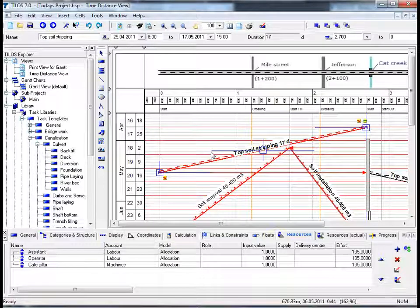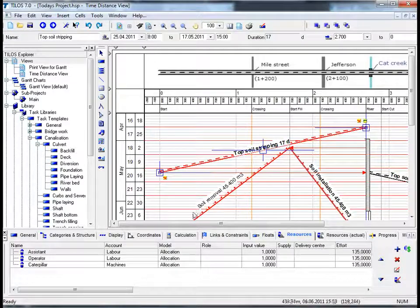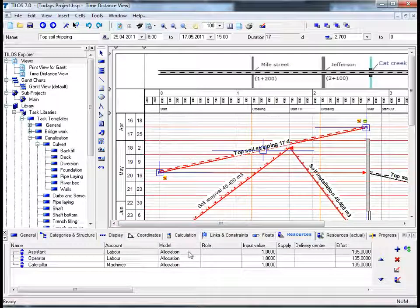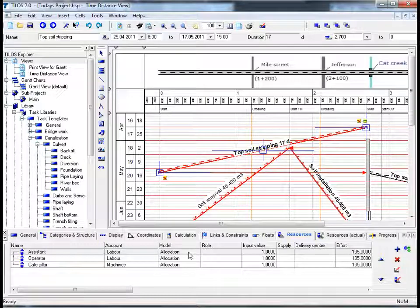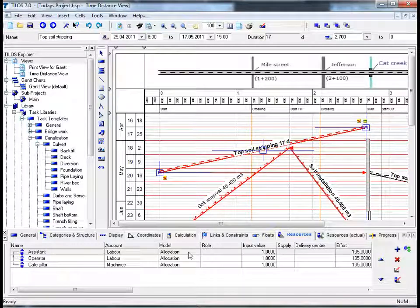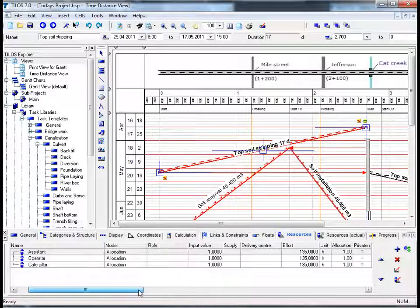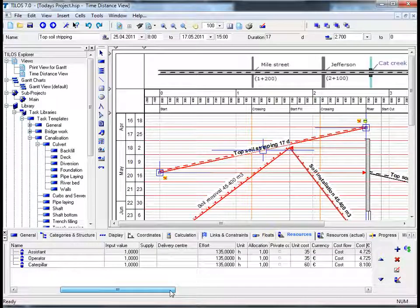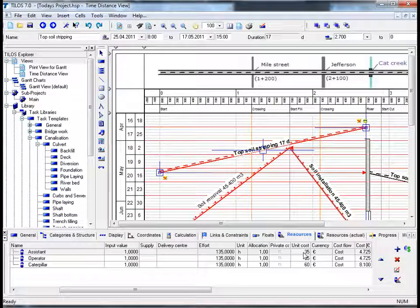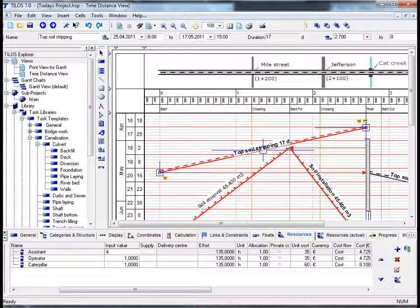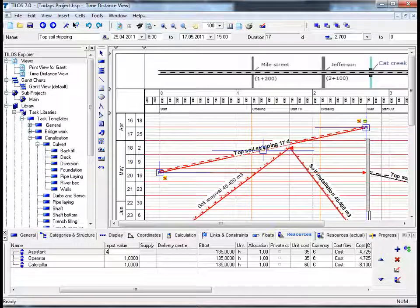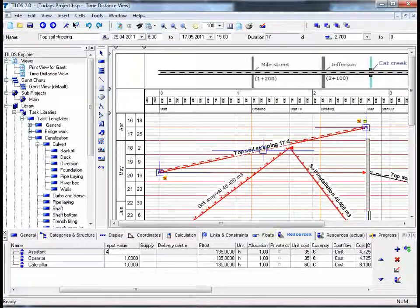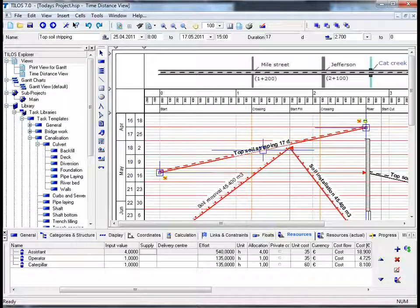If we take a closer look at the details toolbar at the bottom of our screen, we can see that the calculation model that I have applied is the allocation model. This calculation formula is the easiest and simplest way to calculate costs based on the input value and the effort. By changing the input value, for example to 4 as opposed to 1, and by hitting return, please look at the column cost on your far right hand side and you will see that by entering the input value 4, the costs have quadrupled to 18,900 euros.